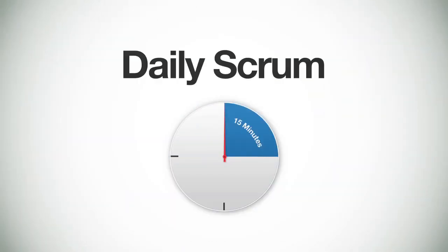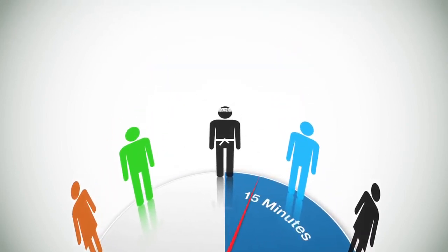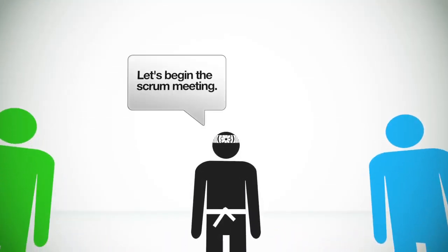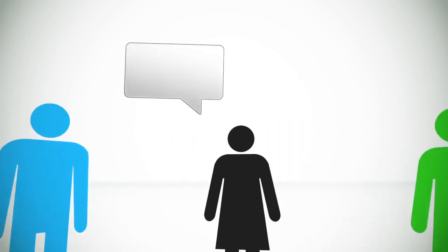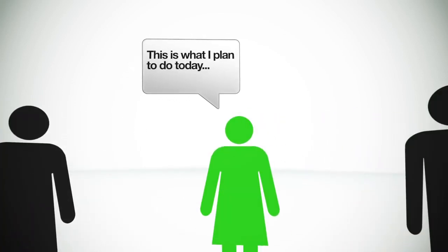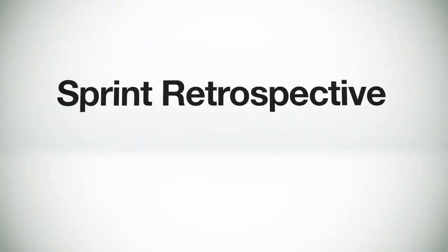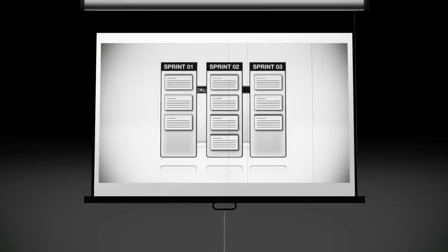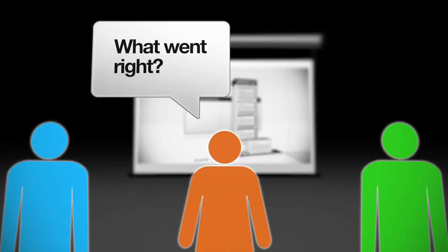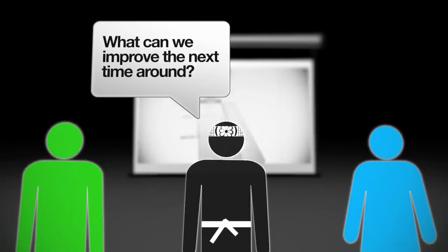And that brings us to this, the daily Scrum. The daily Scrum is an essential tool to having communication flow freely between team members. The idea is to have fast-paced, stand-up meetings where team members quickly list the work they have completed since the last meeting and any obstacles in their way. By meeting daily, it ensures the team is always in sync and any major issues are dealt with as soon as they are known. Finally, as each sprint comes to a finish, it's important to have a sprint retrospective meeting where the team can reflect on what went right and areas of improvement. After all, Scrum is a flexible, agile development method that needs constant improving and tweaking for every team.